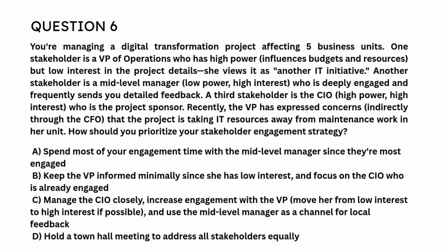B. Keep the VP informed minimally since she has low interest, and focus on the CIO who is already engaged. C. Manage the CIO closely, increase engagement with the VP, move her from low interest to high interest if possible, and use the mid-level manager as a channel for local feedback. D. Hold a town hall meeting to address all stakeholders equally. Correct answer is C. Manage the CIO closely, increase engagement with the VP, move her from low interest to high interest if possible, and use the mid-level manager as a channel for local feedback.